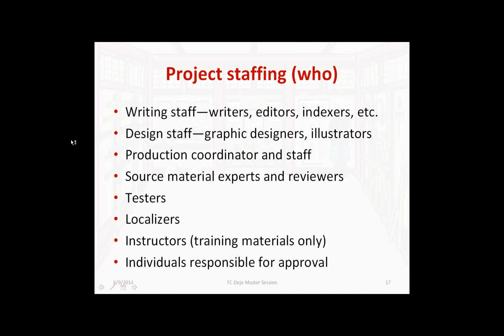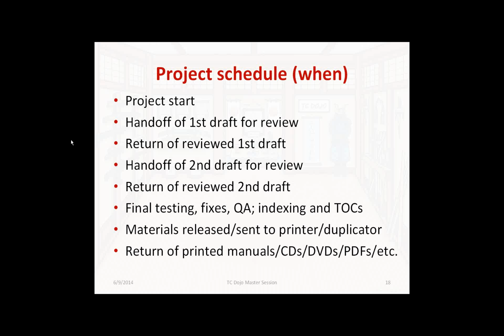And the reason is, if you have a committee responsible for approval, you will tear your hair out trying to get them all to agree on it. You want one and only one person who is ultimately responsible for doing all of that.